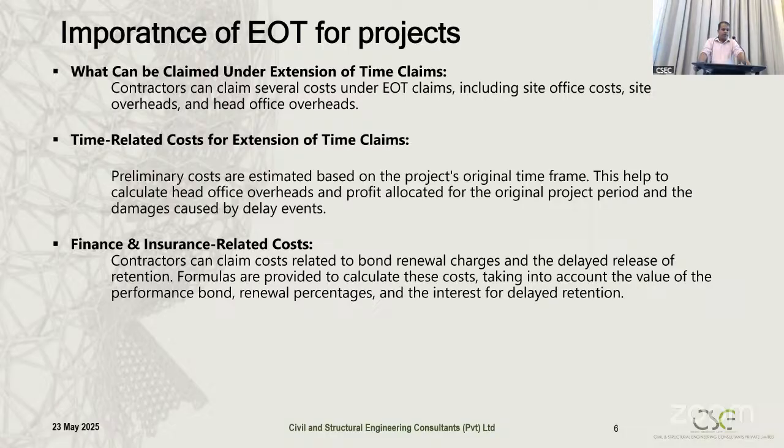Next, finance and insurance related costs. Of course, when you extend the time, we have to extend our insurance, bonds, and other finance related documentation works. We have to continue, and that incurs additional cost. So these kinds of things we can plan with these properly evaluated extended time periods.